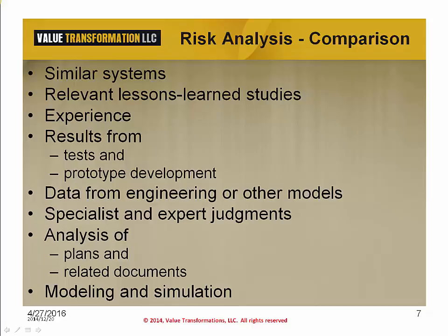We will need people that can see systemic impact of the potential risk to uncover the true severity. We can conduct tests, and not just on the product, to ascertain if our values or what we believe to be true are actually true. We can use tools like Monte Carlo analysis on the schedule to understand what the variation in the schedule would be and understand the risks associated with that. We can question our subject matter experts and talent to understand the consequences and probability associated with specific risks.